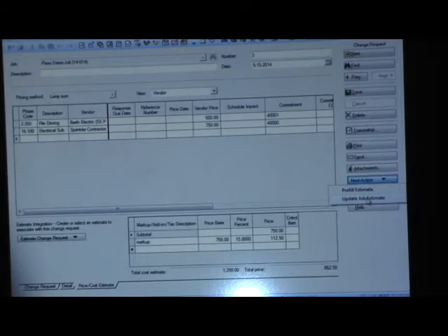As you said, it's bad practice to do it when you're waiting for the owner change order, but it is possible. And if you don't do it, when you do get the owner change order, it will process the estimate change for your cost and the contract change for the contract at the moment you enter the owner change order.